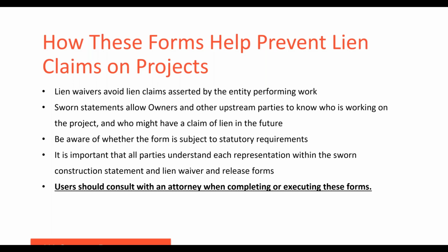And then another thing, Sarah, is it sounds like the procedure here that you should be thinking through. Number one, there's a lot of ways to trip up when it comes to these documents if you're filling one out. So obviously, hire an attorney, let them help you sort it out. Then you need to be thinking about, is there a state-specific form? Am I in one of these state-specific jurisdictions that I need to have a state-specific form? If not, then you should be looking at one of our generic forms or general forms, and then picking between, like, do you need a progress or a final one? Do you need a conditional or unconditional? And again, there are some pretty serious ramifications to making those decisions. So I'm going to go all the way back to the start and consider hiring an attorney.